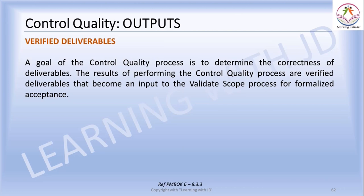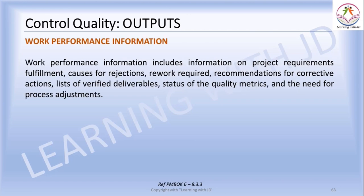Once the deliverables have been checked through sampling and testing, your verified deliverables become an output of control quality. This determines the correctness of the deliverables. The result of performing the quality control process — verified deliverables — becomes an input to the validate scope process for formalized acceptance. Work performance information covers project requirement fulfillment, causes for rejection, list of verified deliverables, status of quality metrics, rework needed, recommendations for action, and corrective actions.